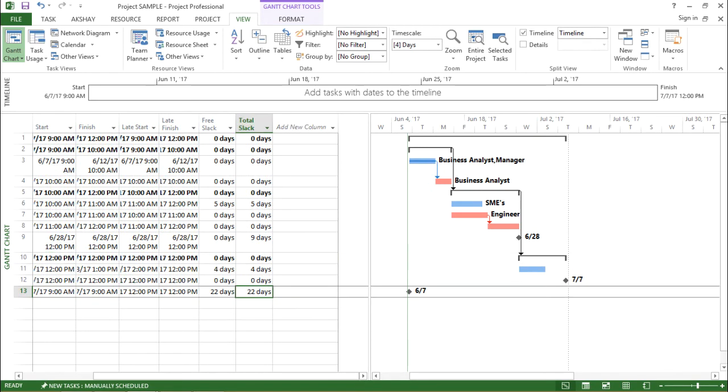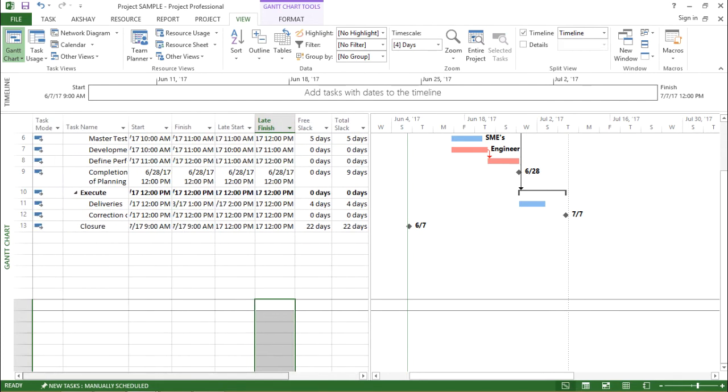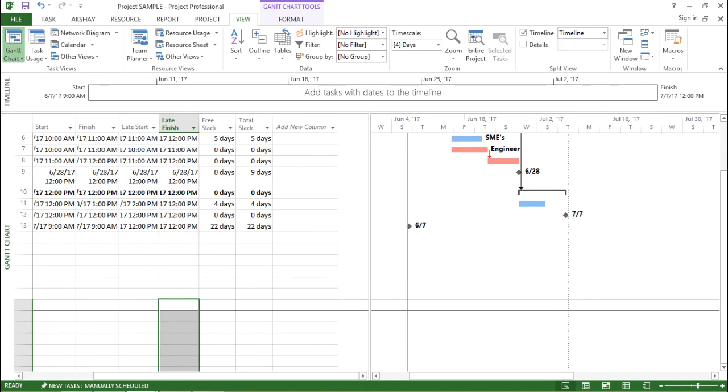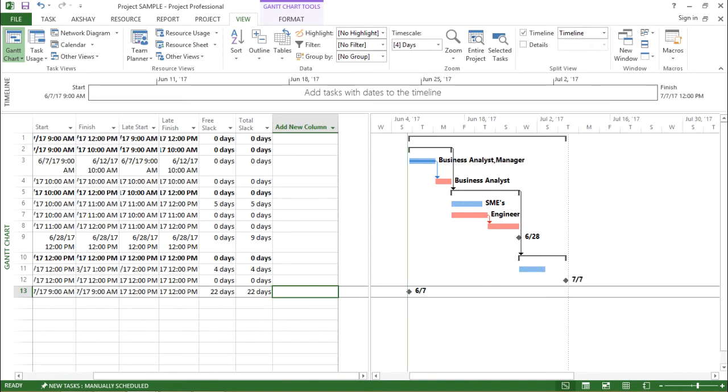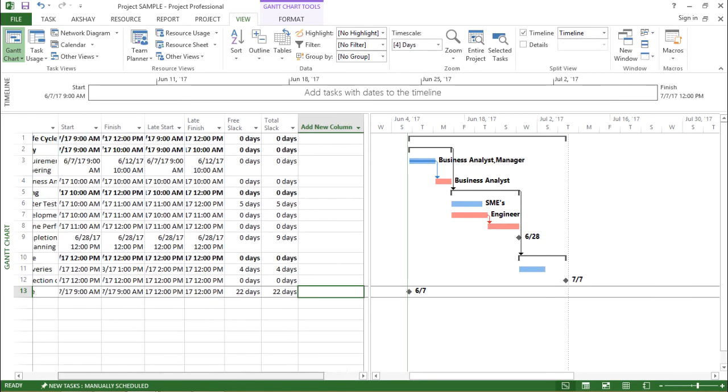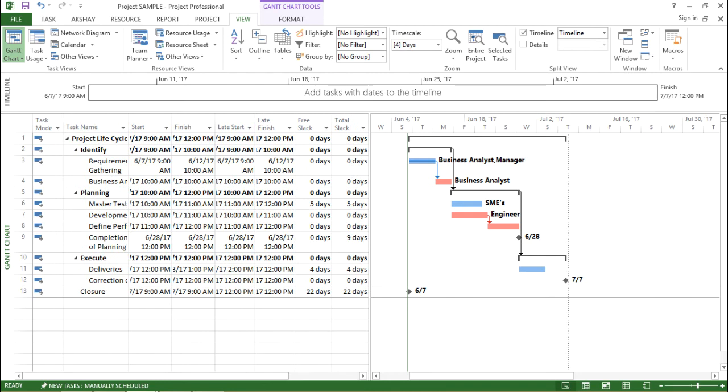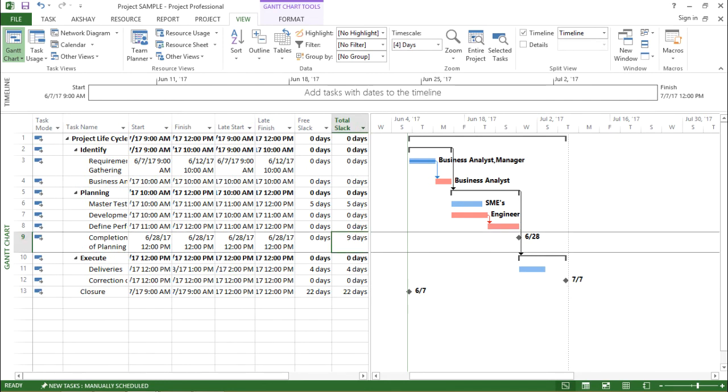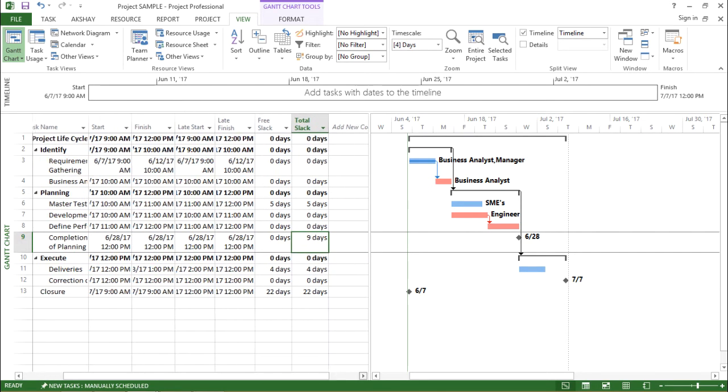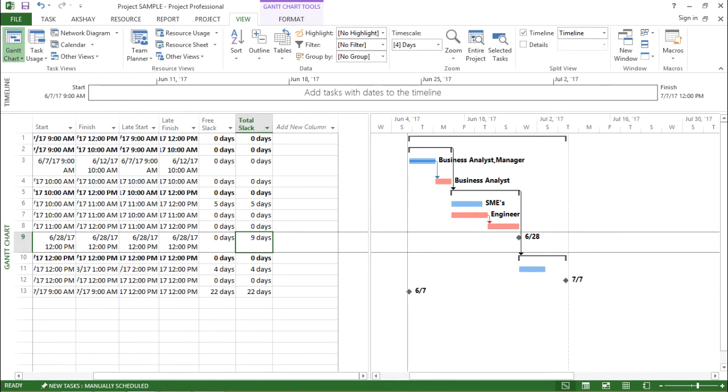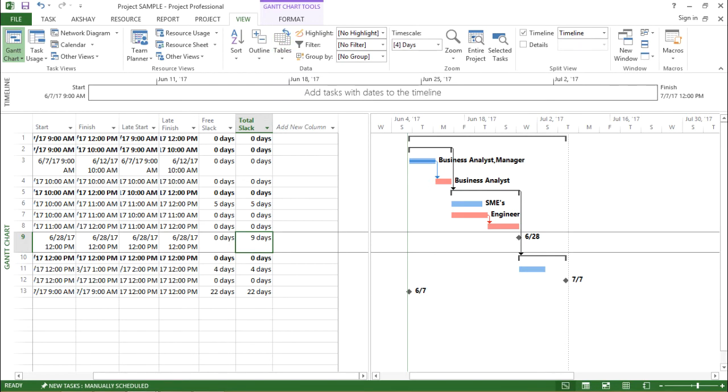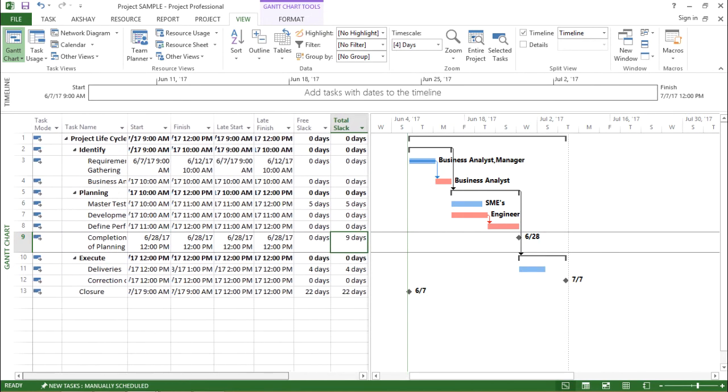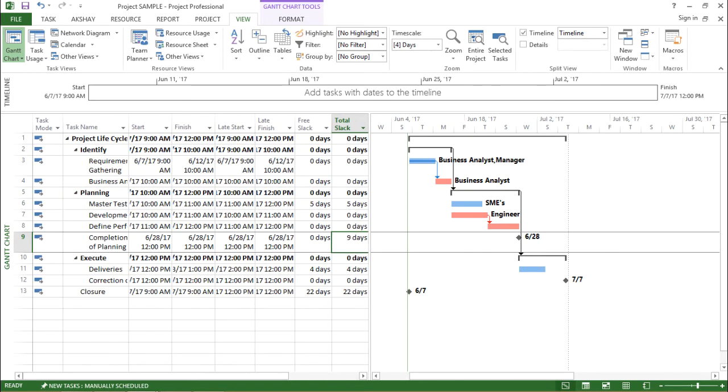If you see there is some slack involved for the closure, it's 22 days. The closure is 22 days. For some of the tasks, it's 9 days. That is for completion of planning. It is showing me the total slack as 9 days. So in this feature, if I click on schedule, it helps me to calculate the free slack or what we call as float. So it helps me to calculate the slack or the float, both free slack and total slack, giving me an overall picture of the project.